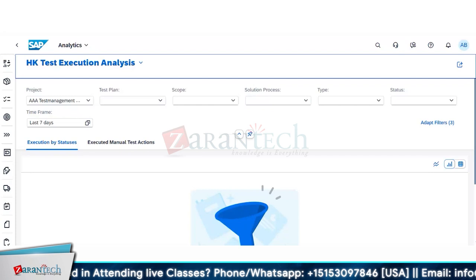When you're developing a custom thing, at least you know, okay, I have to create a form, a new UI, a Fiori catalog with a few tiles, a new screen or customize an existing SAP screen. So you can estimate the effort, probably 8 days, 10 days, and then you take a buffer. But when you're in testing and an issue comes back to you, first thing, we have not estimated it.